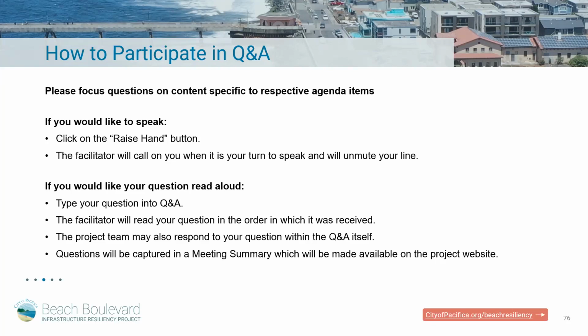Yeah, good questions. I can speak to the moving forward. There's been quite a history of this project and coordination and collaboration with adjacent property owners and the city, and city representatives would be better able to speak to those. But I'll take the second part about moving forward. This group has a pretty robust agency engagement plan, and as I mentioned, we've already started meeting with the Coastal Commission staff, and we'll continue to do that through the advancement of the design, the notice of the scoping process, and the public review stage of the EIR, where we expect to initiate permitting.